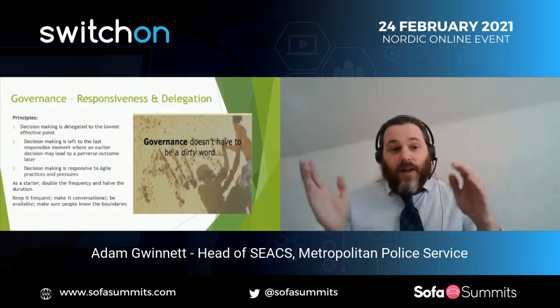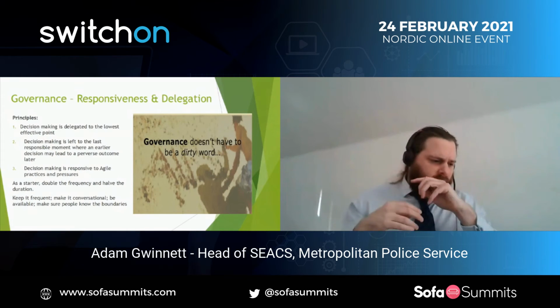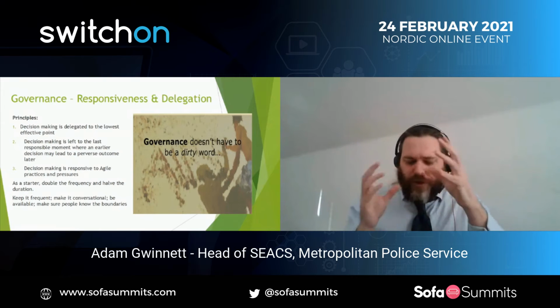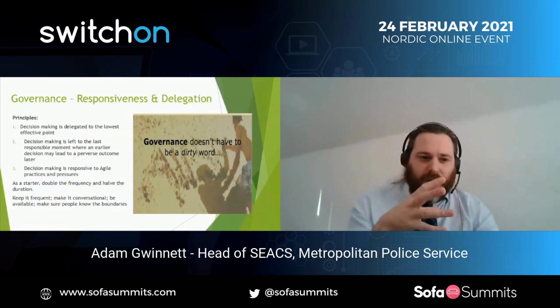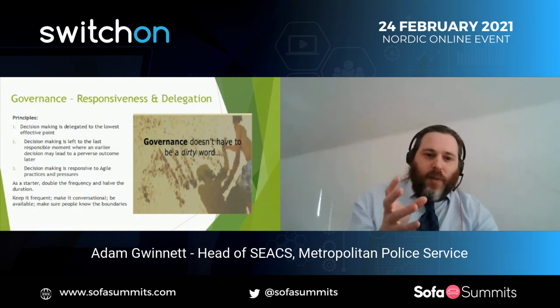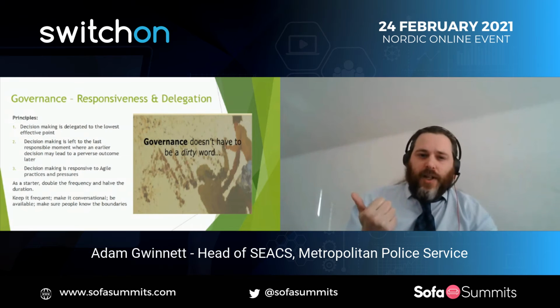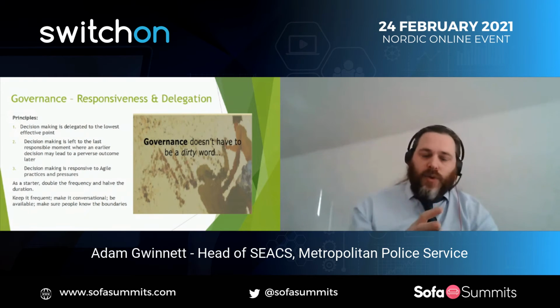So effectively, as a start for that, I'm a big fan of The Goal, if any of you have read it, which is the story around introducing agile processes. Well, that was in a manufacturing context with the concept of halve your batch size. So effectively, what I did was double the frequency of governance sessions, like all of them. If they happened fortnightly, they became weekly. If they happened monthly, they became fortnightly, etc.